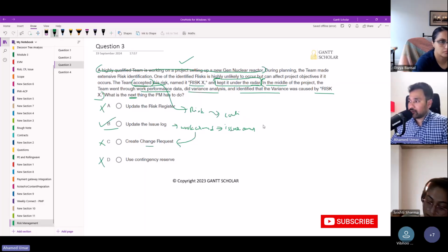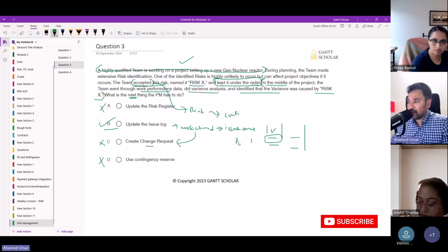So in the risk register, we will have a column for risk strategy and risk response. Whatever risk we mark as going to manage with the accept strategy, those risks' PI scores need to be continuously evaluated throughout the project as part of the monitor risks process, because there are chances that either the probability score or impact score or both can increase. And when that happens, you have to plan for a valid risk response and manage them proactively.